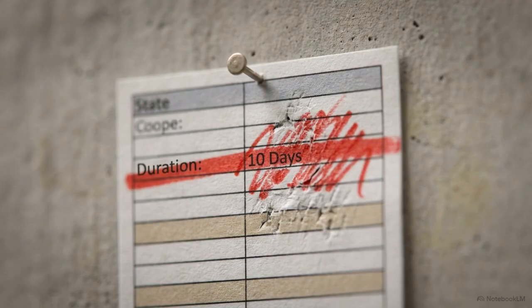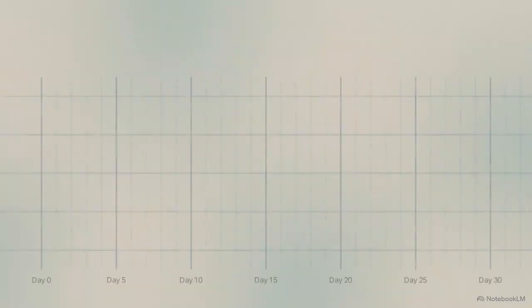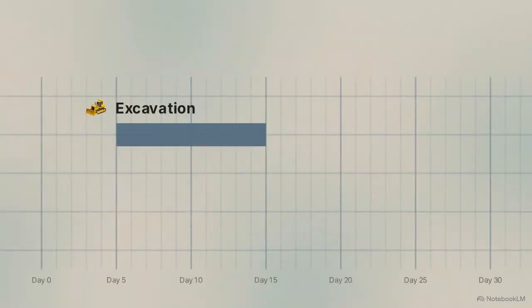A leveled schedule still relies on a dangerous assumption that tasks take an exact, fixed amount of time. Weather systems, supply chain disruptions, and human error make construction inherently probabilistic. Modern planners abandon fixed durations, integrating risk assessment directly into a task to create a fluctuating probability cloud.